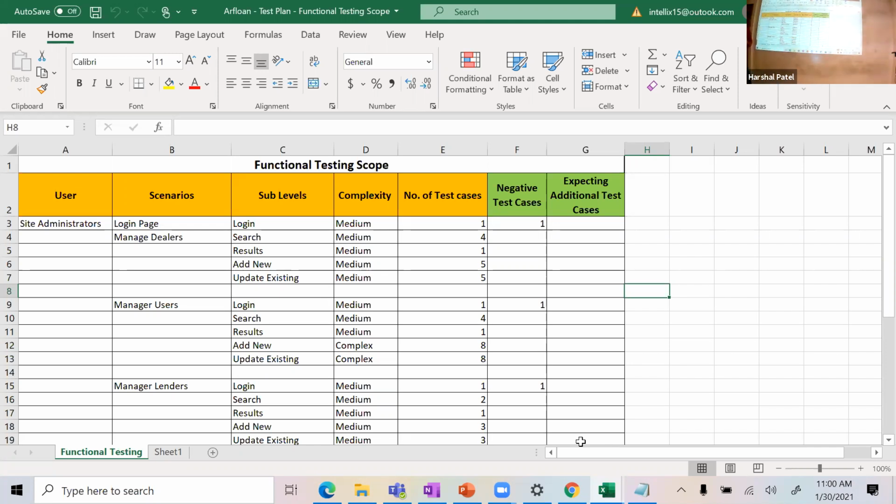And then if you want to get a little more advanced in your estimate, you can say, is this scenario complex, simple, or medium? Obviously, the login scenarios are a lot simpler than testing whether I submitted a credit application successfully or not, because there are so many data fields. So you can put in an estimate and say, in order to do this, I need X amount of simple test cases, Y amount of medium, and Z amount of complex. Based on my experience, complex test cases take this much time, so I multiply by those numbers and come up with an estimate. This is how long it's going to take, which is now much more reliable than the number I put in before, because I had some scope understanding before I did it.